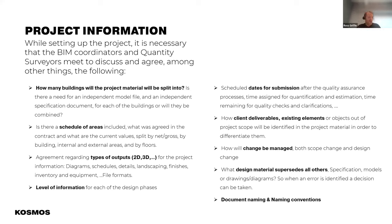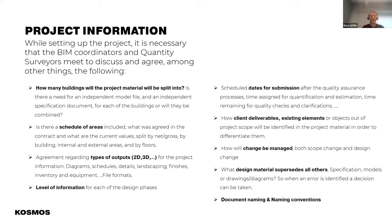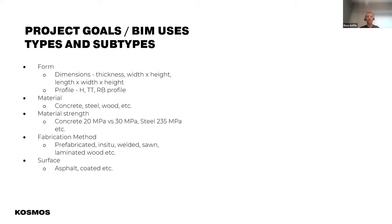How will change be managed within the models? Traditionally we would cloud drawings, but it's different within models. We need to understand how change is going to be managed, both from a design and scope perspective. Design material supersedes all others. A lot of companies are anxious about giving models out, especially during procurement and tender. But if we clearly define what the model is for and what documentation hierarchy exists, from our perspective the model is just for information only. It's still contractually required to deliver drawings and specifications, but that should be defined so everybody's clear. Finally, document naming conventions — ISO 19650 will define that for the Irish market, but it needs to be agreed with the client and be part of the BIM execution plan.